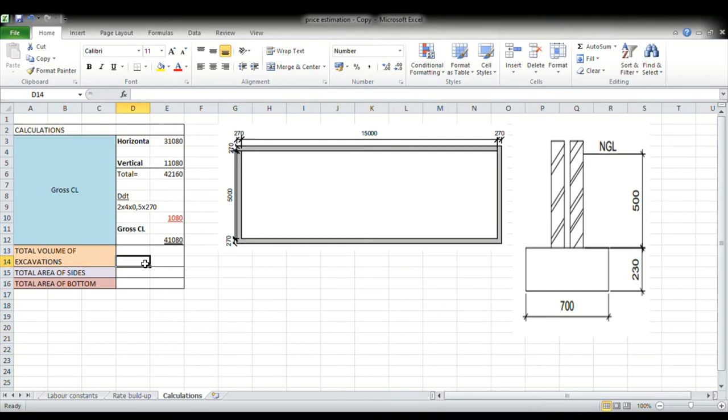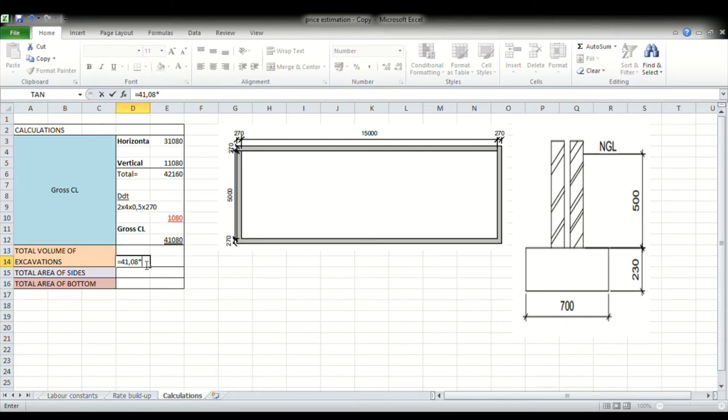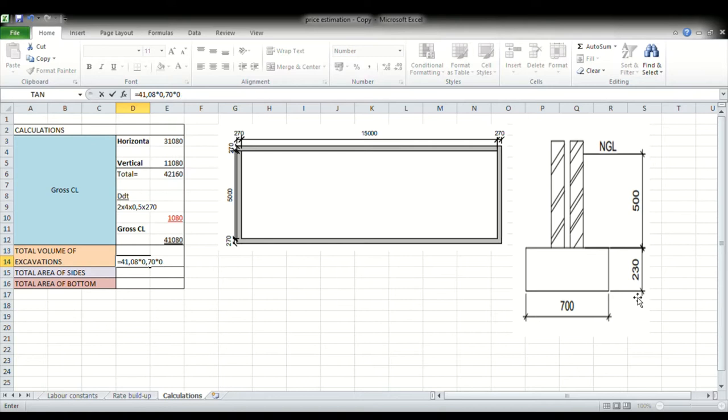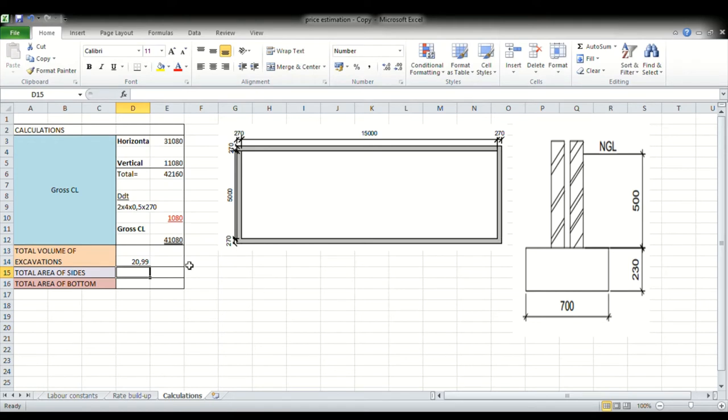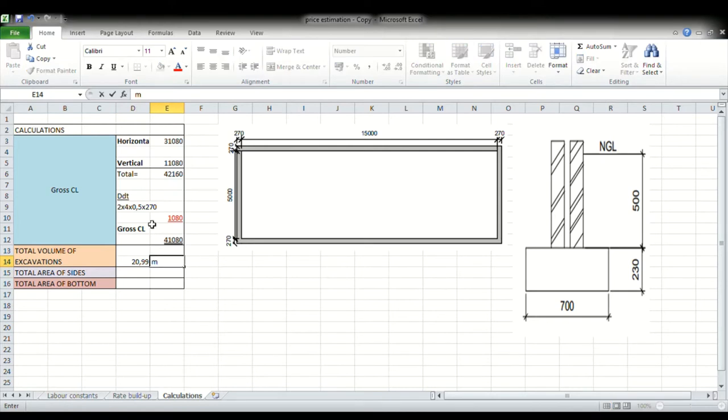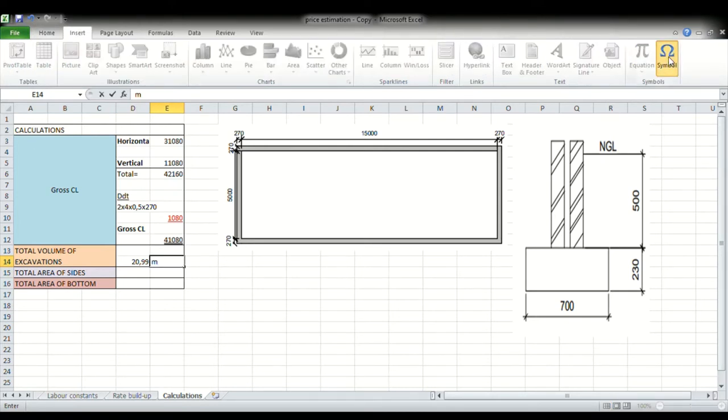Now our course center line is going to be that total minus that, which gives us 41,080. So that's our course center line. Now to find the total volume of our excavations, that has been worked out by the QS already: 21 cubic meters. But yeah, I just need us to work these out. So for the volume of our excavations, we will take our center line, which is 41.08, we will multiply it by the width of our excavation, which is 0.70, and then we will multiply it as well by the depth of excavation, which is 0.73. It gives us 20.9, and I'm going to work to those two decimal places. We have cubic meters.